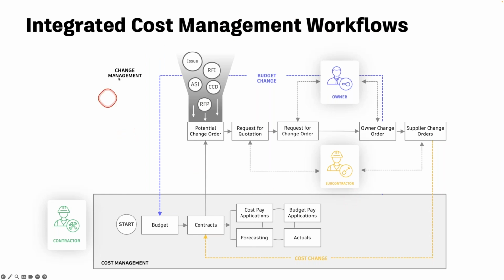Our change management platform allows you to manage all of your upstream change orders, as I like to call them. So upstream with the client or the owner, submitting change order requests, getting approval for those. And then you're also able to manage those pricing exercises with the subcontractor and send that subcontractor their change order and get them paid for any additional scope on the project.